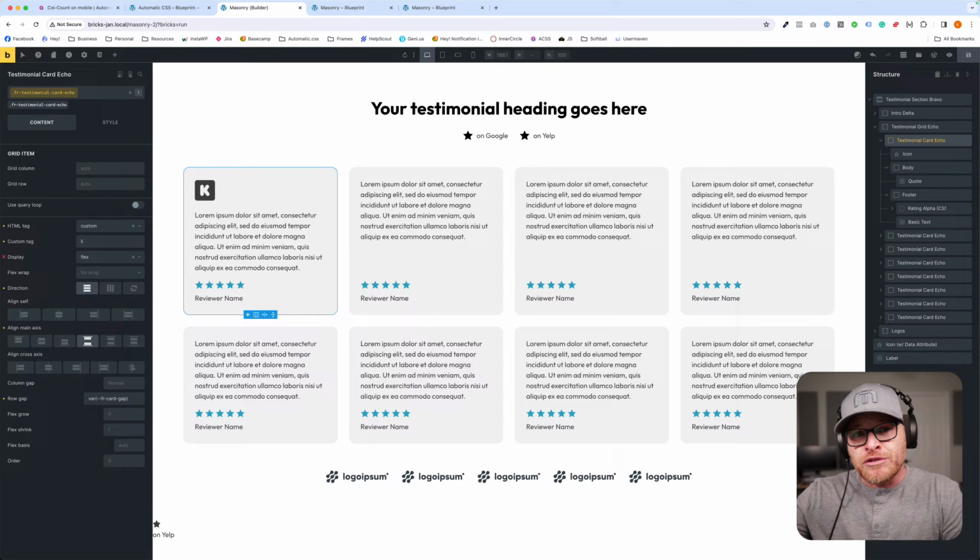Now, do we have to go through this process? Yeah, in fact, we do. Because if you don't go through that process, it's a lot of headaches, it's a lot of nightmares, it's a lot of working backwards, 2 steps forward, 1 step back. Sometimes 2 steps forward, 3 steps back. And it's just wishy-washy back and forth. So what we do is wireframe, green light, great? It does not go to UI until it has a green light on a wireframe. Then it goes to UI.